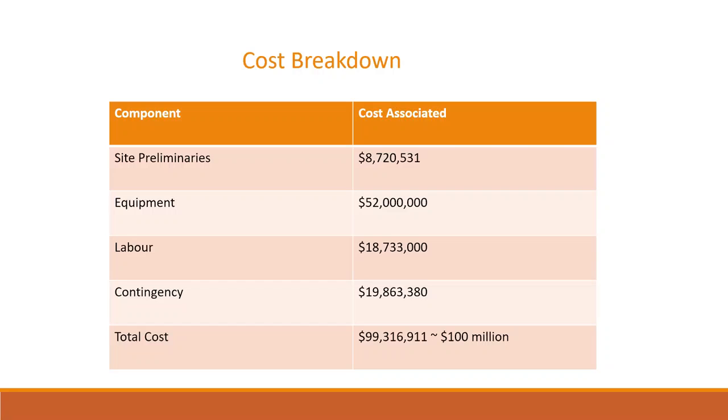Considering the intrinsic cost by remediation technology, the budget has been broken down to: number 1, phase 1 environmental impact assessment, number 2, bioremediation technology, number 3, remedial design, number 4, management plan costs, number 5, labor costs, and contingency costs. It has been assumed that the project continues for a period of 11 years on 400 hectares of land with almost 9 million cubic meters of polluted land.